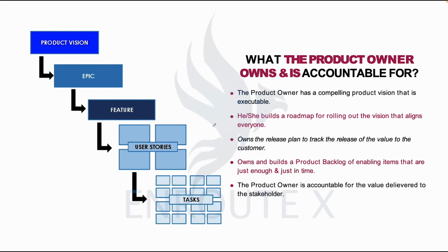Or you could decide, let's do the first layer of the infrastructure, then we go over to building the buildings. You could actually have the buildings completed while the road network had not been fully completed. So in that illustration, your release plan and the roadmap would indicate that the buildings would go into full development ahead of the road network.